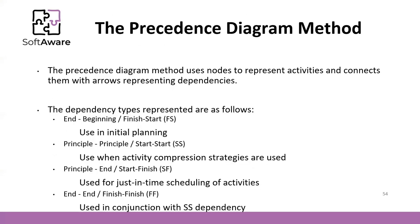The Precedence Diagram Method uses nodes to represent activities and connects them with arrows representing dependencies. The Activity on Arrow method uses arrows to define activities. Here, in the Precedence Diagram, we use the nodes to represent the activities.